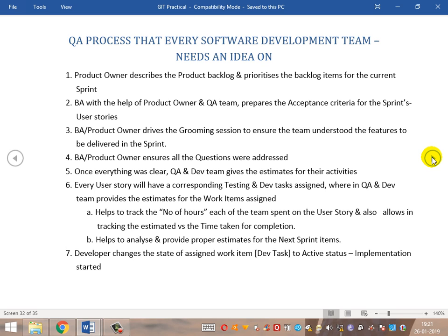Based on this, the product owner describes and prioritizes the product backlog. Once prioritization is completed, the backlog items are pulled into the sprint backlog based on priority and organized by high, low, and medium priority items. Points are assigned to each feature or user story — like 3, 5, 8, 11 — to indicate how tough it is to build or implement. A critical or complex solution is rated high and takes more time. These points are assigned to each work item and user story.